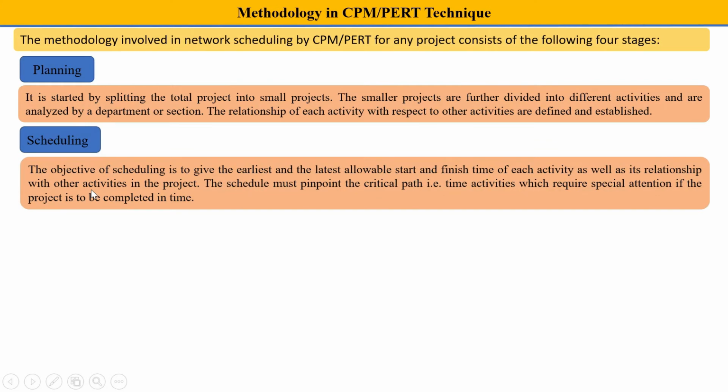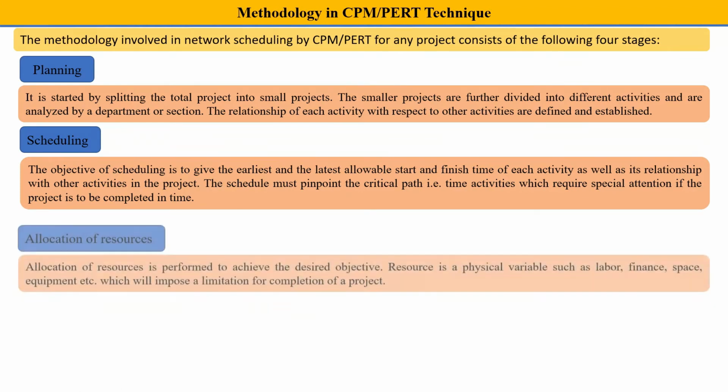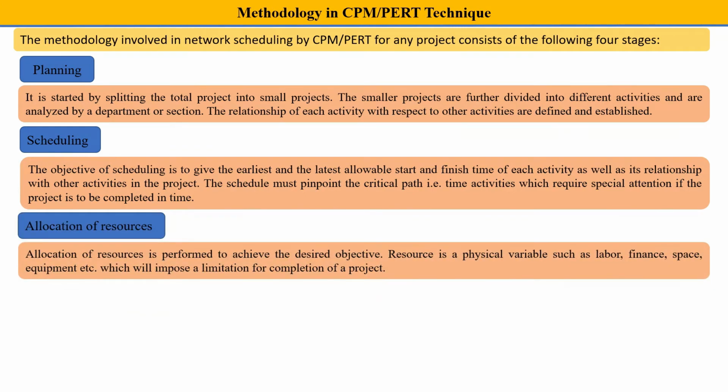Now scheduling. The objective of scheduling is to give the earliest and latest allowable start and finish times of each activity as well as the relationship with other activities in the project. The schedule must pinpoint the critical part, the activities which require special attention if the project is to be completed on time. So scheduling is very important because it will give you a certain dimension of when it is going to start and when it is going to finish. Okay, so it is very important for understanding.